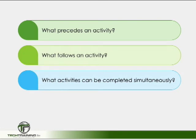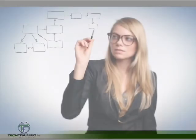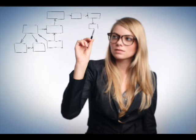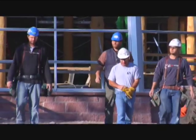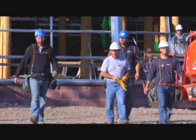A schedule should be created as a management tool in the field. We must be clear about which activities follow a particular activity, which activity precedes it, and which activities can be done at the same time. These questions can be answered by precedent diagramming, often referred to as IPA — looking at every activity's immediate preceding activity. Putting activities in order is not as easy as it may seem; the reason two activities must be done in a particular order is referred to as a constraint. Without constraints, all activities could theoretically begin at the same time.